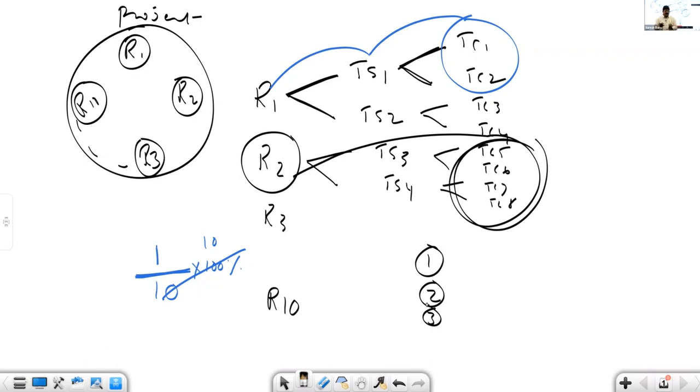Because the test cases and test data are already prepared based on the old conditions, now the customer asks for some changes at a particular requirement. Now we are able to trace which scenarios and which test cases belong to this money transfer. So it is very clear to the QA team that these are the scenarios and test cases to be updated as per the new conditions given by the client.